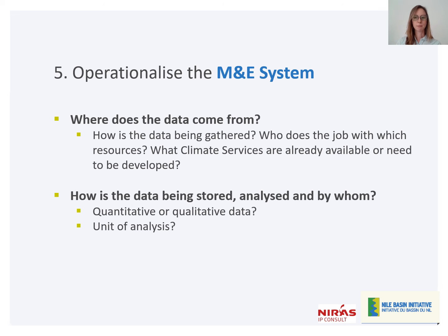You'll also need to think about the unit of analysis. For example, it could be people, it could be a given site, it could be an infrastructure system, or it could be one specific infrastructure component. And it's important that you think about what that unit of analysis is as you're planning this, because which unit of analysis you choose will change the results of your monitoring and evaluation.